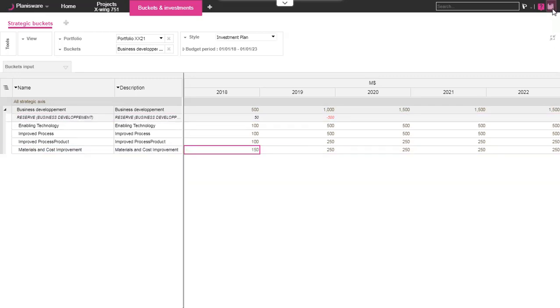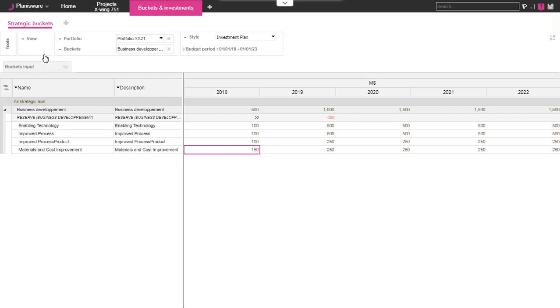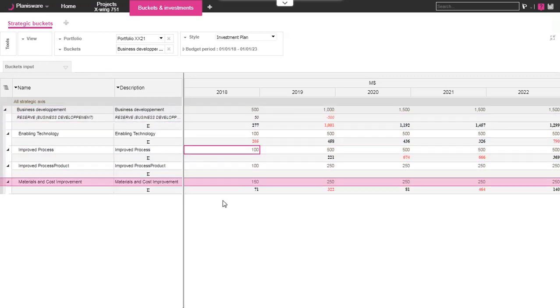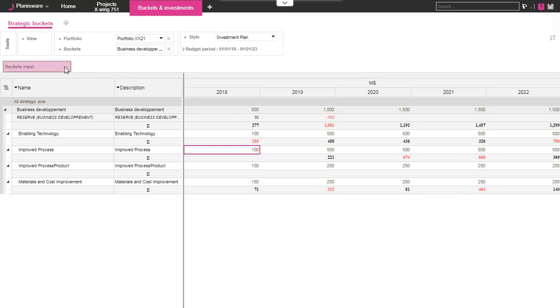Afterwards, supposing that the project managers have already planned their projects, an option is available to see how your allocation matches with the estimations of these project managers. In the table, you can see the overruns in red.